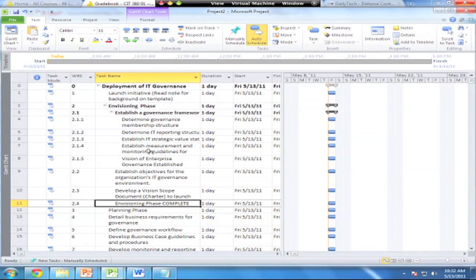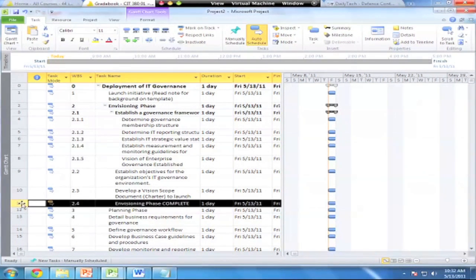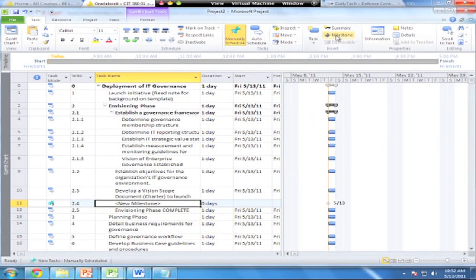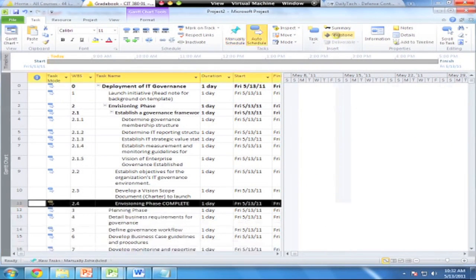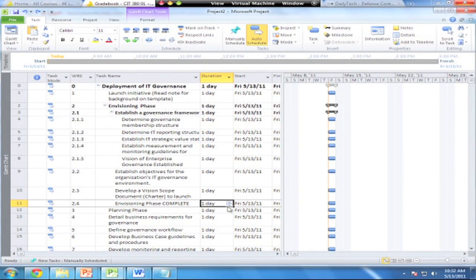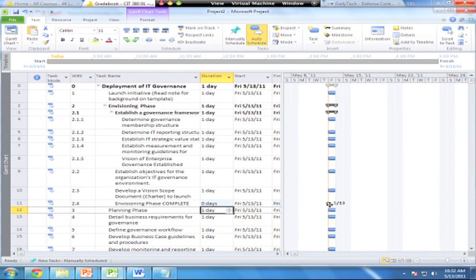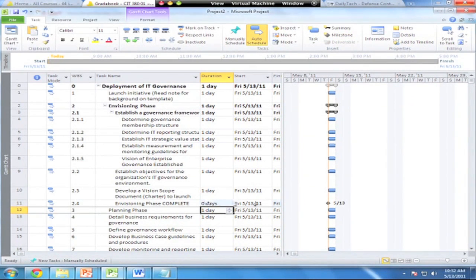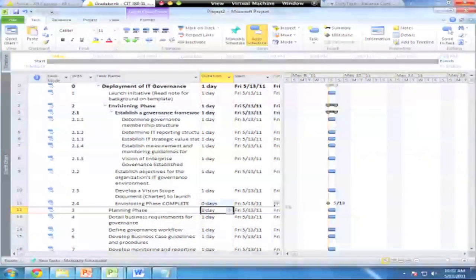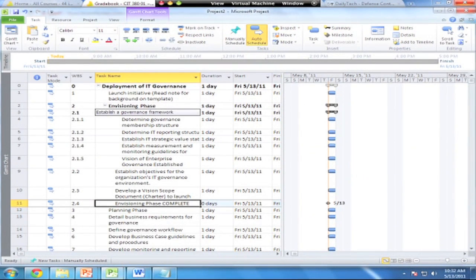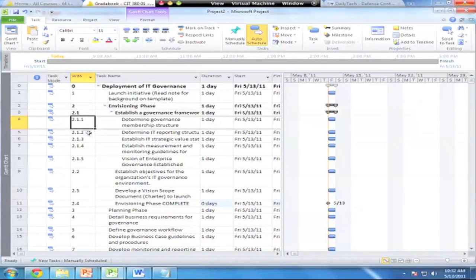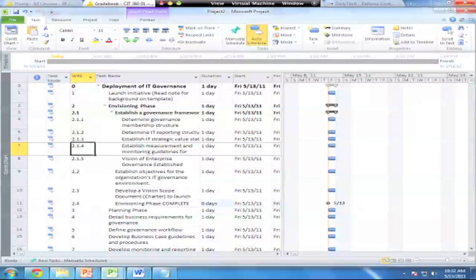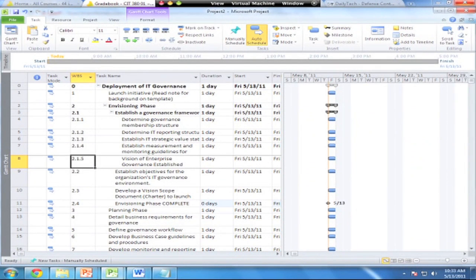I'm actually going to leave that in there on this version and turn this into a milestone event. If I click on this last one and click on the milestone, it's going to create a new one, so that's not what I want to do. I actually want to just switch this and give it a zero-day duration. Notice how that changes the icon there where the bar turned into a diamond with a date on it. That becomes a milestone. When the planning phase is complete, that's going to be our milestone to say, okay, we've reached a completion point and we've completed our envisioning phase. This is how to build and work with the WBS. You notice that it automatically renumbered everything for me according to a standard WBS format and numbering scheme. That's the basics of working with the WBS portion.